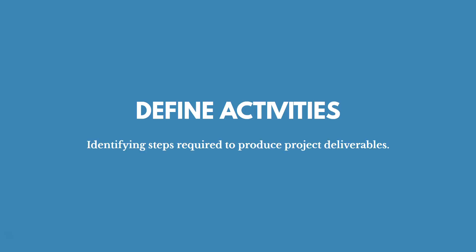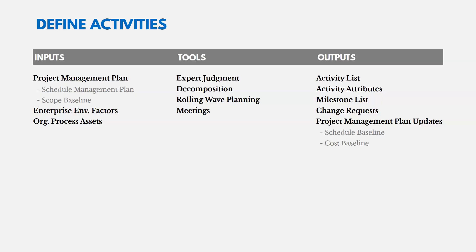Now let's talk about Define Activities — identifying steps required to produce project deliverables. The inputs include the project management plan (including the schedule management plan, which tells you how to define activities), enterprise environmental factors, and organizational process assets. The tools are expert judgment, decomposition, and rolling wave planning.